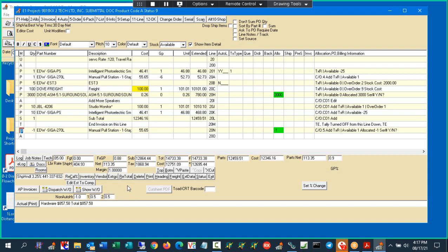So that's one of the things that if you're using external projects like X1, X2, X3, then they're not being attributed to this job. You could run a WIP report and combine them together, which would be one way to go.